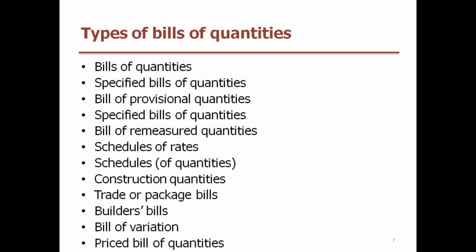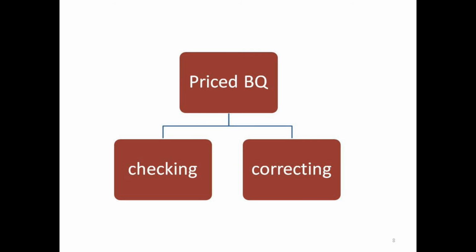A description often has, it might have a full description of what's required, a certain beam, a certain type of hardware, whatever it might be, but it might also in the write-up still provide them with some reference back to a drawing detail or back to a specific product, naming a particular item. It's all about making it much more efficient, quicker and easier for the builder to follow, and then also for when you're starting to administer the project too. So the bill of quantities really is a communication document that's used for several different functions.